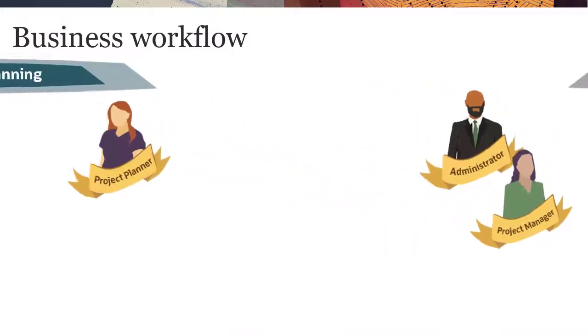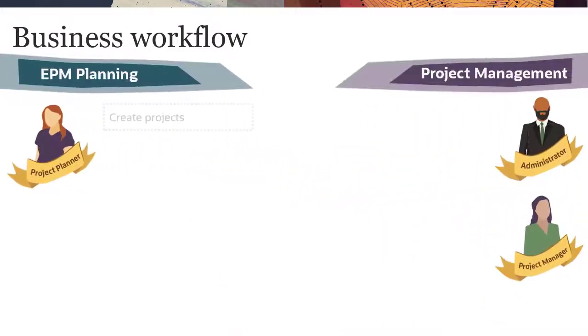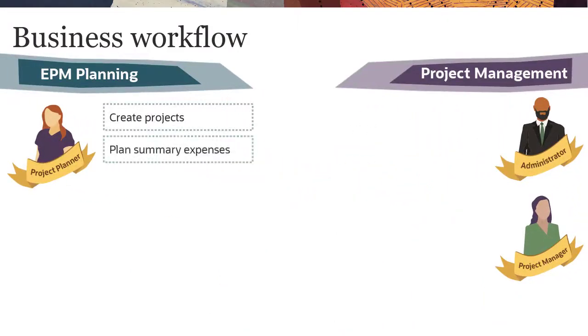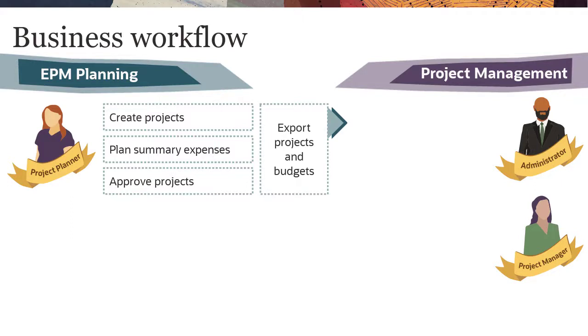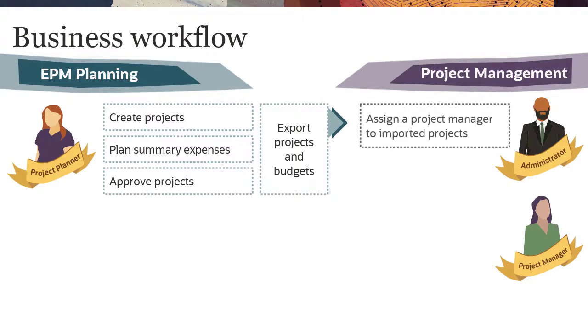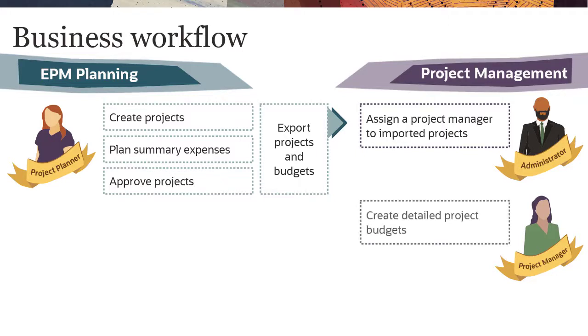An EPM Project Planner creates projects, plans summary expenses, and approves projects in EPM Planning. They then run integration jobs to push projects and project budgets to Project Management. Once the projects exist in Project Management, an admin-level user assigns a Project Manager.